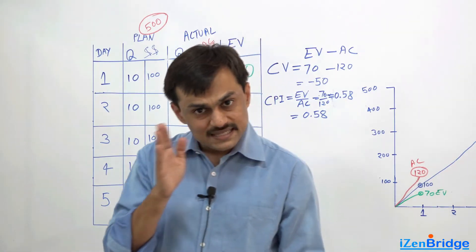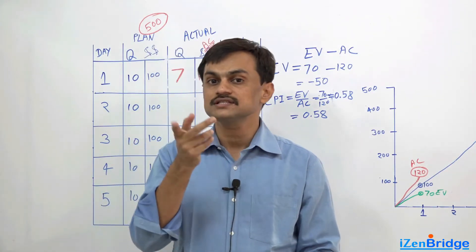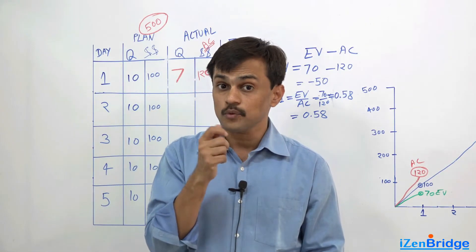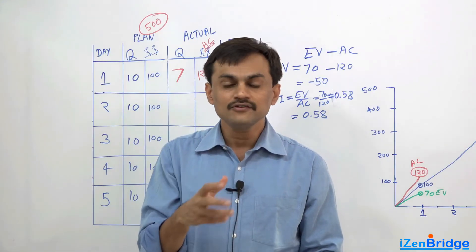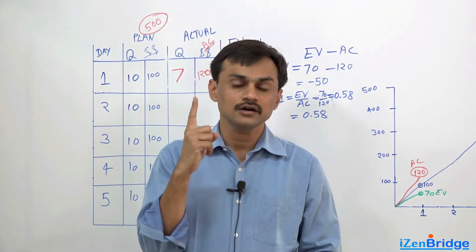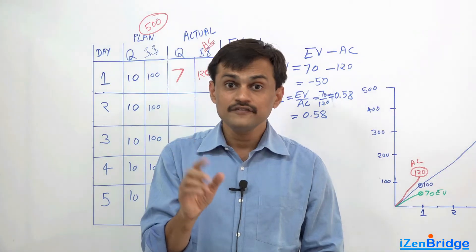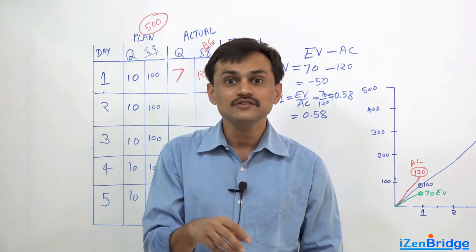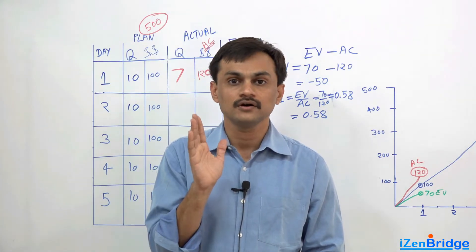Now how much less than 1 also shows the similar amount of inefficiency. If it is 0.5, it shows that we are getting 50 cents out of $1, we are that behind. If it is 0.2, it shows that we are getting 20 cents out of $1.